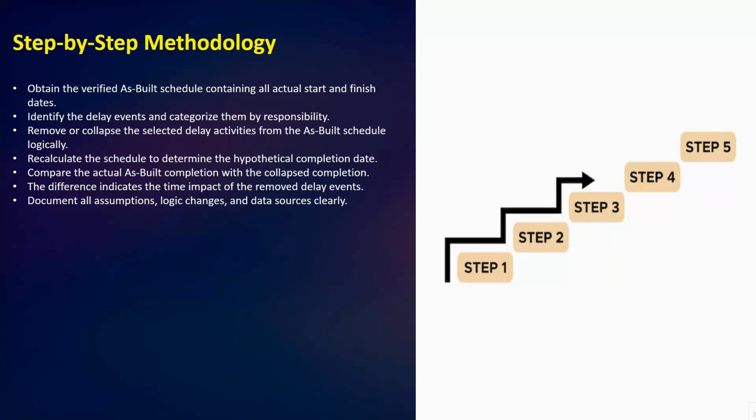Okay, third, we remove or collapse the selected delay activities from the as-built schedule logically. Sequentially remove the chosen delay events from the as-built schedule. These steps simulate how the project might have progressed if those specific delays had not occurred.